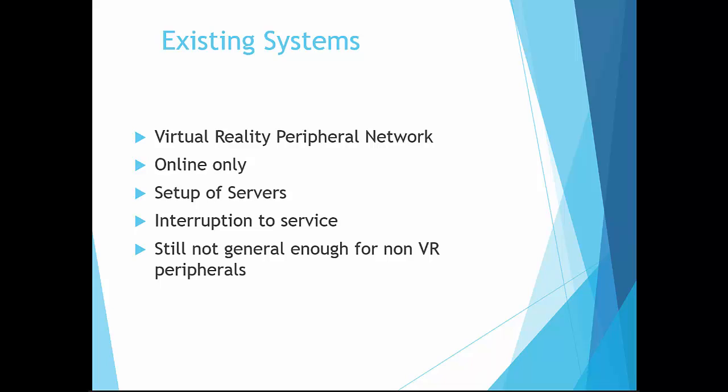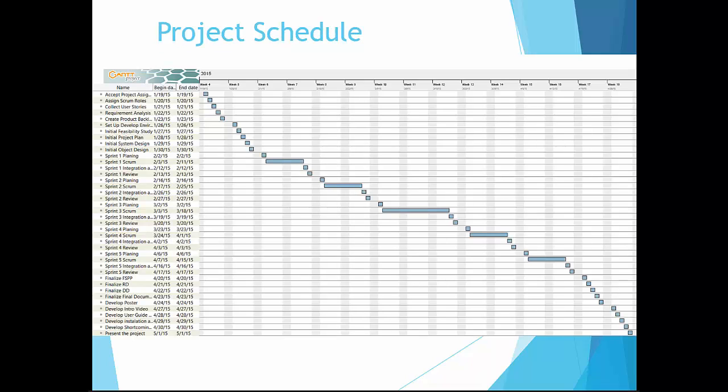This is the project schedule for version 1.0 of the visualizer. We are using an agile approach to the development of this software. In this approach, we are splitting up the work into different sprints, 5 to be exact. During each sprint, which is a length of 2 weeks, we have scrums, which is basically the work that needs to be done during that sprint.